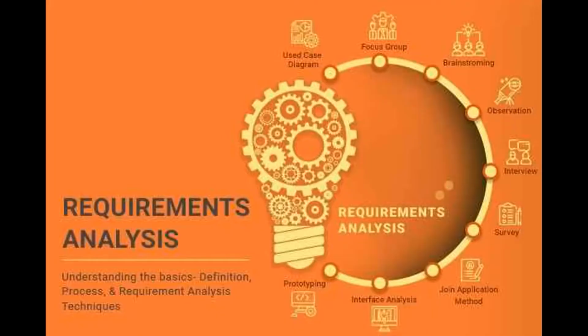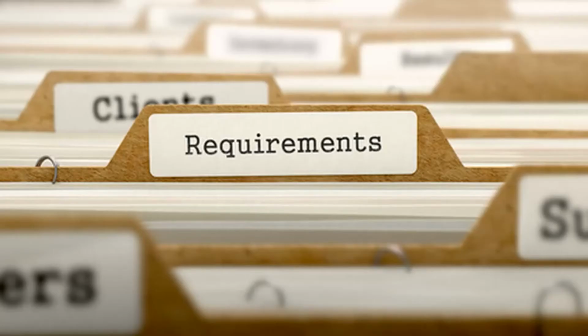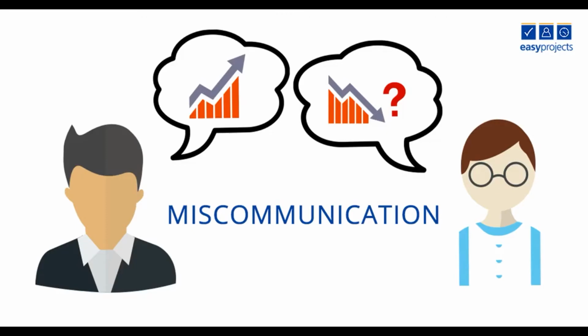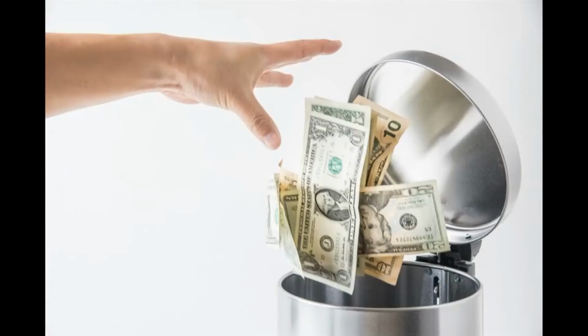Phase 1, requirements analysis, is often overlooked, but is probably the most important phase. This phase ensures the purpose of the product. Whether building software yourself or even implementing software you have purchased, it is always a good idea to sit down and discuss with your client, whether it be an internal department or an external customer, and determine what their actual requirements are. Too often, miscommunication in this phase costs problems or money down the line, and wasted energy and expenses on solutions that don't even meet what the customer is trying to achieve.